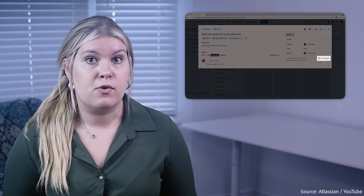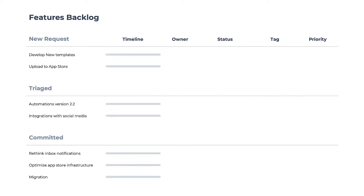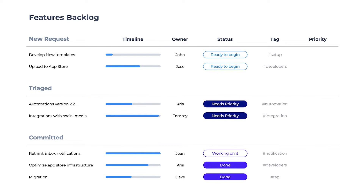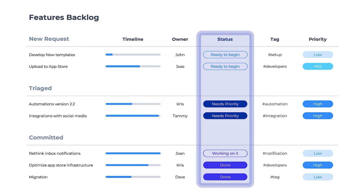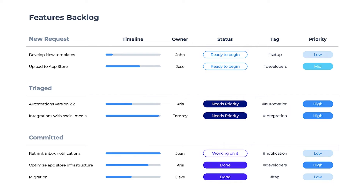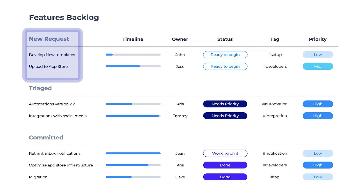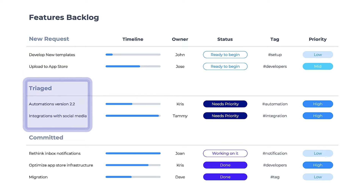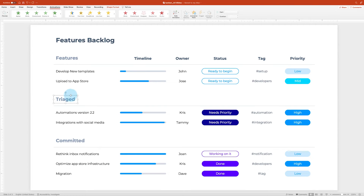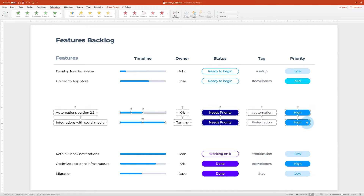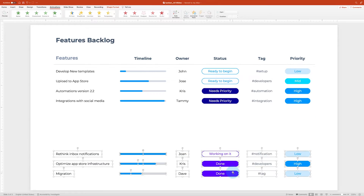Since these new tasks or features can pile up, Kanban utilizes a features backlog. It's important to make a backlog manageable and visualize a timeline for completion. This board organizes tasks by status and progress, showing new features that have been requested, ones that have been triaged or sorted out and assigned already, and ones that are in progress or near completion.